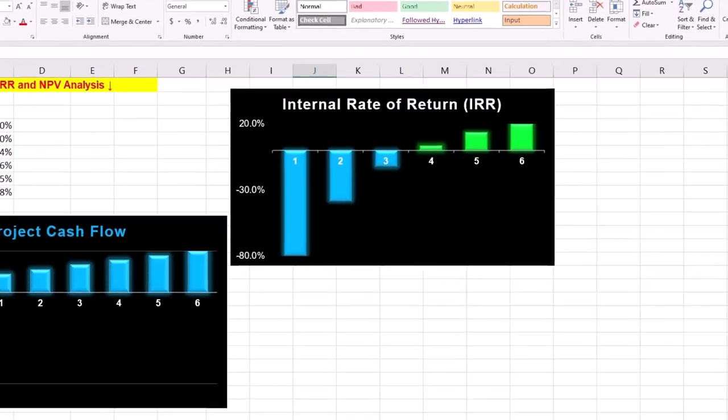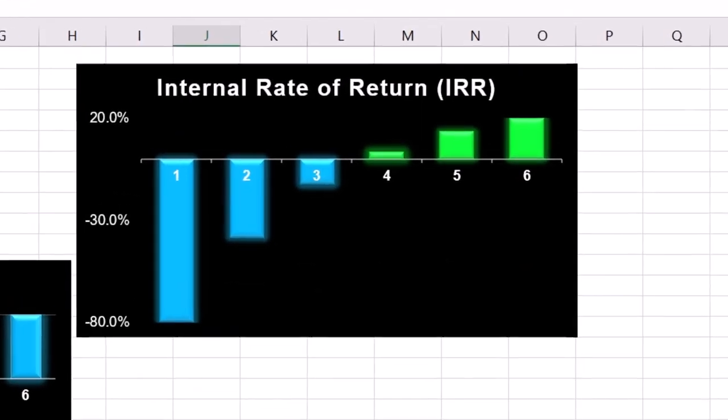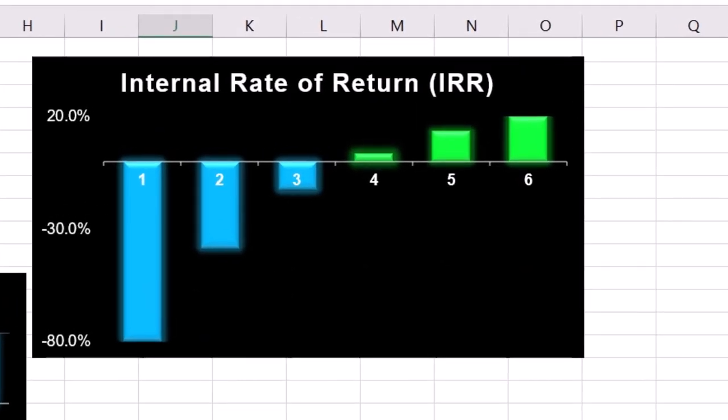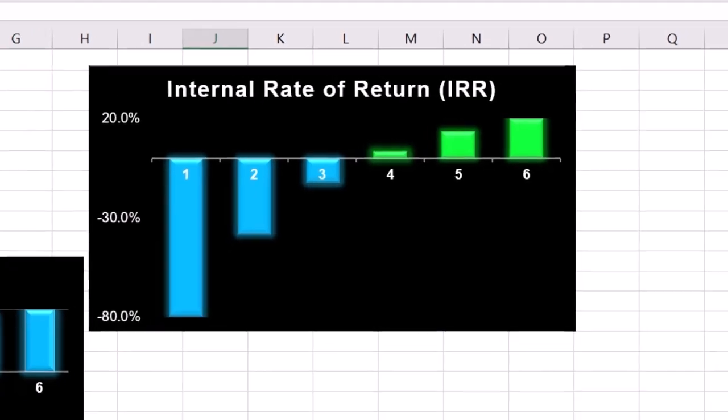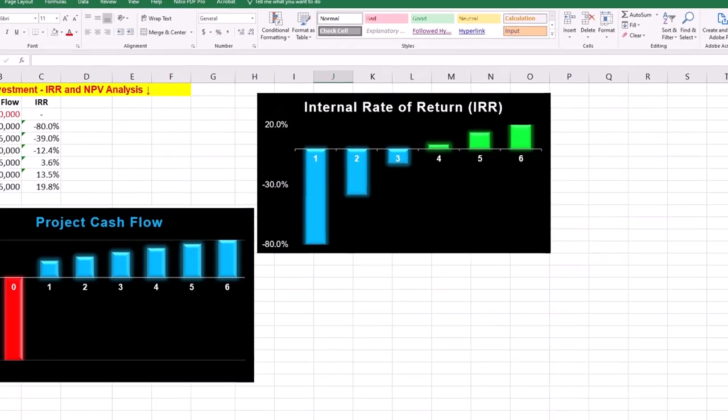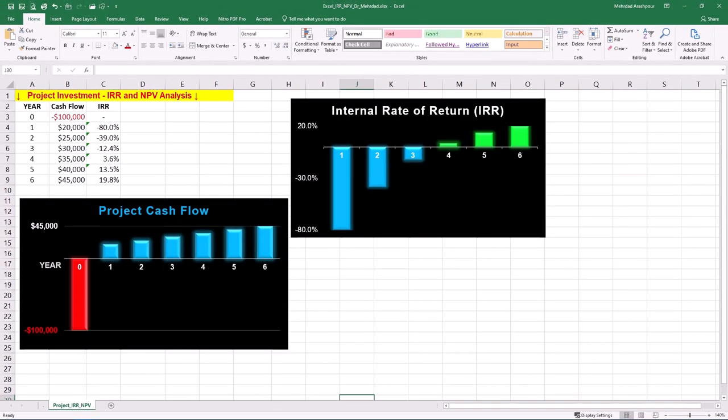After the first year, the project has a significant negative IRR of minus 80% due to initial cash outflows. The IRR becomes 3.6% by year 4, which means the investment has broken even and achieved a modest rate of return. By year 6, IRR reaches 19.8%, showing the return achieved over the full project lifespan. In other words, the interest rate you earn on the augmented reality investment is 19.8% after 6 years.